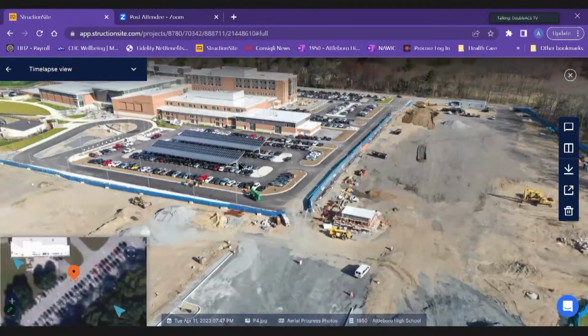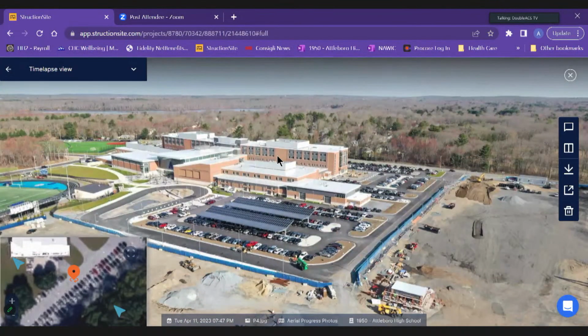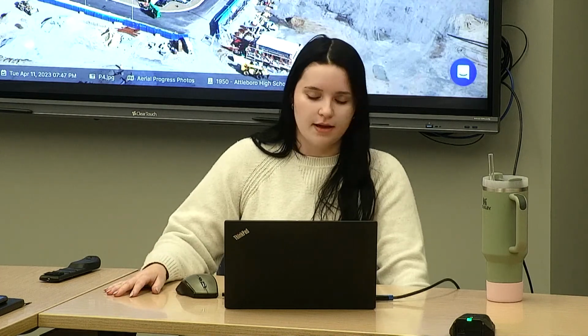And then, as you were talking about earlier, the Rotary began yesterday, and that will continue on until the summer. And then inside the building, this week we were finishing up a bunch of punch list items, including the utility trusses and the third floor science labs, some miscellaneous hardware that was changed throughout the building, and then some paint touch up and small things like that.